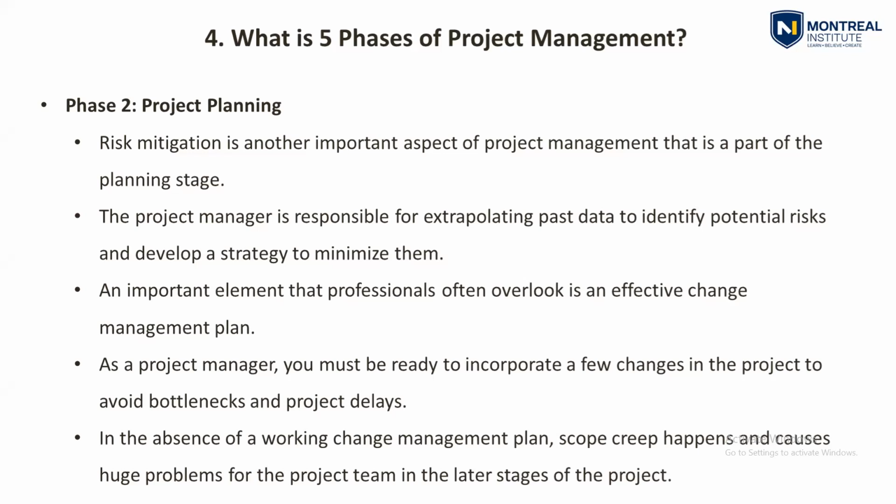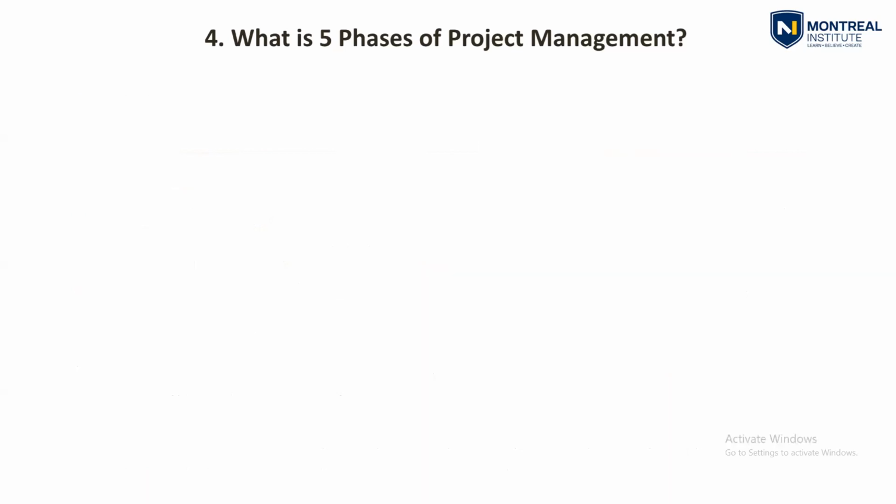So this can happen at the later stage of the project. If you have that experience from your previous projects, you can clearly mention in your contract or subcontract agreement that the sanitary ware installation is included with application of sealant. So it will be very clear for both parties.